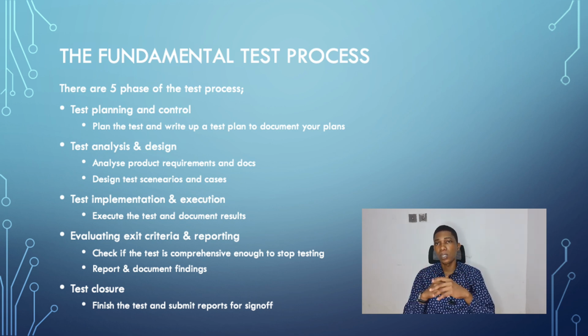At this stage of testing, you have to plan your test, right? You have to plan what you are going to test and how you are going to test it. This involves writing up a test plan. That plan is going to detail what you are going to test, how you are going to test it, the models of the software you're going to test. What kind of browser are you going to use? What kind of software are you going to use to run the test?